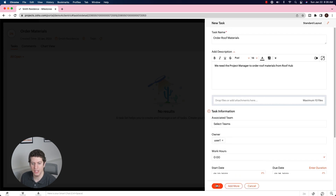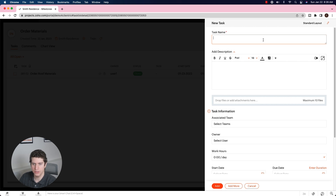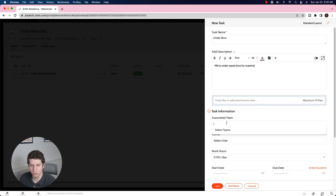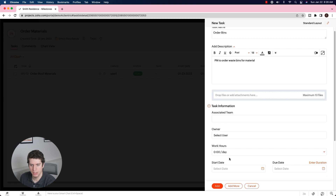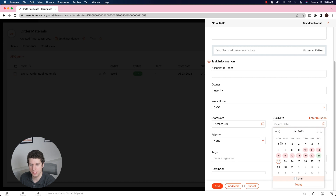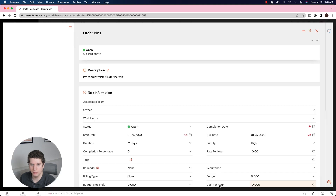Clicking add — we now have the 'Order Roof Materials' task. Let's add another one for the project manager: 'Order Waste Bins,' since we need waste bins to throw off the shingles. The description is PM to order waste bins. We'll select User One again, set the start date to the 24th, and the due date to the 25th. That one is also high priority, so we'll add it in.